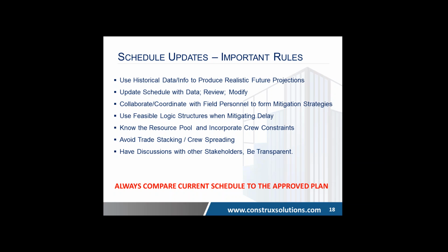And you modify that by talking with people. You talk to them in the field. You have a meeting. You figure out, based on everybody who's involved, particularly the people involved in the issues that you've identified as being impacted, you discuss with them mitigation strategies. You put them on notice if they're causing it. And you ask them how they're going to fix it. And you offer ideas. You get everybody to offer ideas. And then you go incorporate that. That's getting everybody on the same page. It's producing a schedule that reflects what everybody's agreed to. And it's like a little huddle. It's just like before a football play, when everybody agrees to the play and then they run out and run the play.